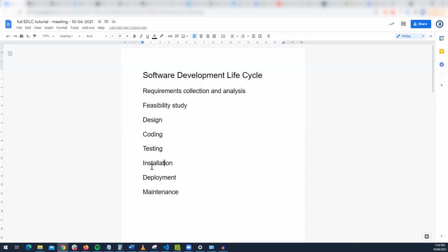If it's some sort of really risky project where the requirements have to be set at the very beginning, and you can't have the scope changing throughout the project, then you'd probably use waterfall.